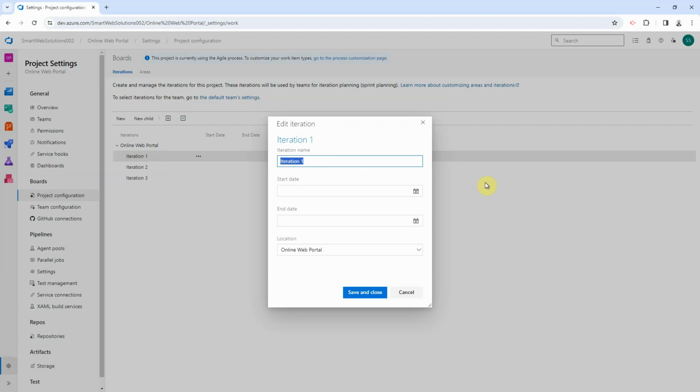We'll follow a naming convention, like we'll call it sprint. And then given that we will be working on bi-weekly sprints, we can assume there'll be a total of 26 sprints in a year, right? And then we are going to start the work in 2024, so we'll start with the sprint 2024-01. Okay, so this is the naming convention we can follow. So our sprint will start from January 1 and then it will go on for 2 weeks. So it will end at January 12th.